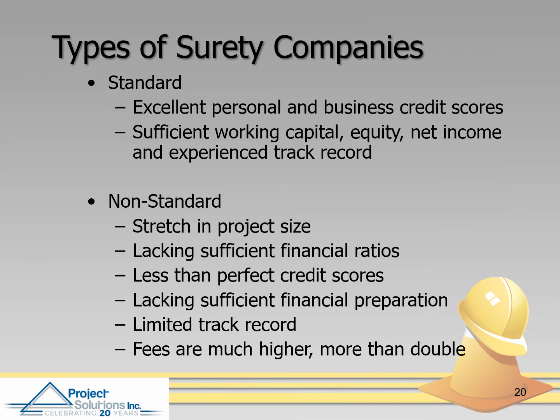Standard surety companies rely on and make bonding for firms with what we would call excellent credit scores, strong working capital, equity, net income, and experience track record. Now, there's still a market for bonding for companies that don't fit that model necessarily. As you can imagine, their fees are much higher, often more than double.